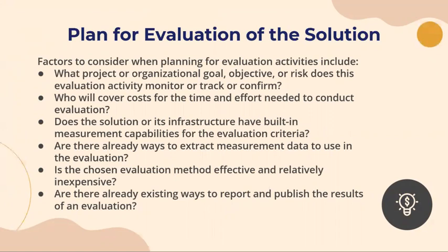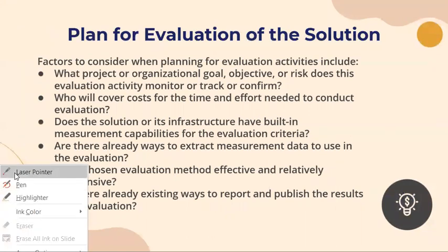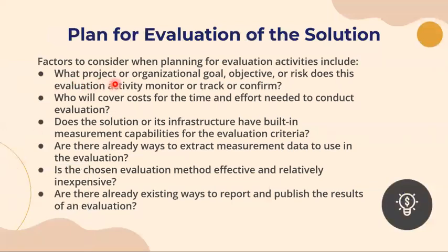So these are factors to consider when planning for evaluation activities. First is what project or organizational goal, objective, or risk does this evaluation activity monitor or track or confirm? Okay. Who will cover cost for the time and effort needed to conduct evaluation?